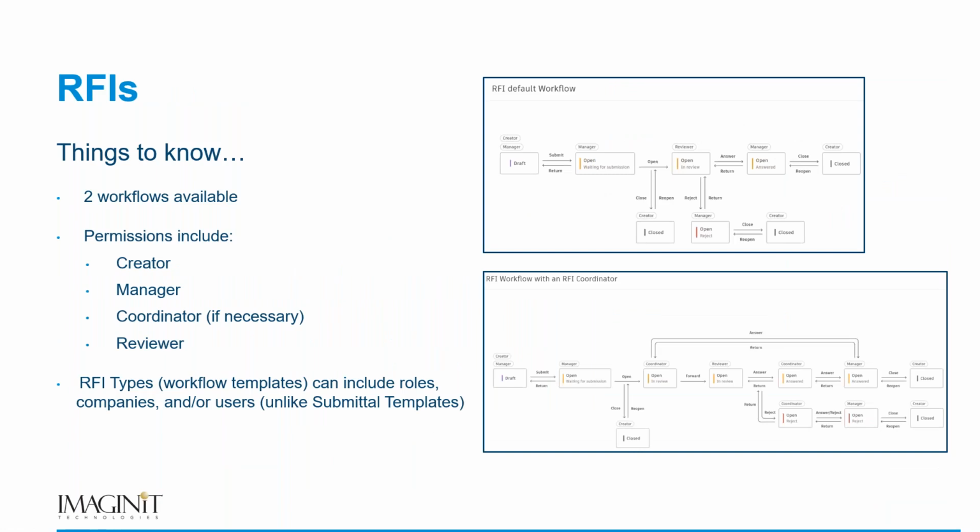For RFIs, a few other things. RFIs are a little bit more, I wouldn't say free or flexible. It's just a different kind of format that we have to be aware of for an RFI. There are two workflows available, and I've screen capped both of these workflows. So the default workflow just includes a manager, a reviewer, and essentially the creator, the person who poses the RFI or creates the RFI. So that's the default workflow. So it goes creator to manager to reviewer, back to the manager, manager answers it or approves the answer, and then it goes back to whoever created that RFI.